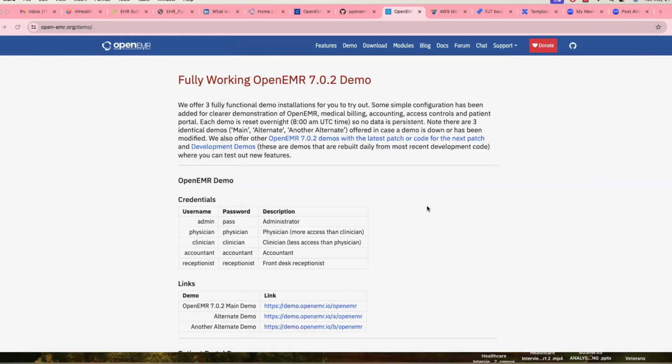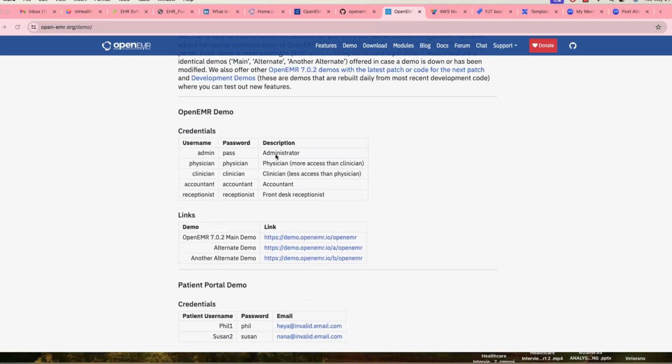If I say today is the end of May, and I want a fully working software in August, then this needs to be a very fast-paced project. So you have to discuss with your developers and say the client wants the full module. Can we do that, or are we going by phases? Do you want to do only the receptionist part first and then go one by one? Is the business owner okay with that approach, or do they say, no, we can wait until September or October, but we want a fully functional, end-to-end working system with credentials for the physicians and everyone?